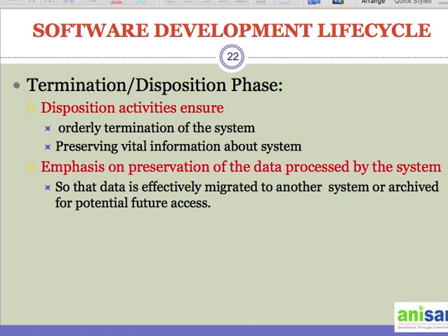So that is how you have to archive and give them appropriate information. For example, if you have archived on a hard disk, there could be a password, so document that and give those details to the required stakeholders. Now preserving data is very important, because most regulators want every business to preserve the data for a certain time. For example, if it is accounting, you have to preserve the data for 7 years. And the second part is that the business may discontinue one product or service, but they want to preserve the customer data so they can use that information for future products and services.